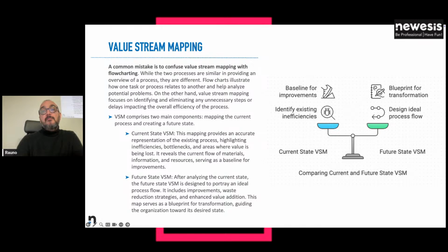When you do a value stream mapping, you are not just designing the fact, and we will see a couple of examples after, that you first have the requirement phase, and after the requirement phase, you go to the analysis phase, and then you go to the development phase. But you measure and put down, so you need to collect a lot of data, that the requirement phase takes an average of 2 hours for each requirement to be written, but each requirement is in the queue before.